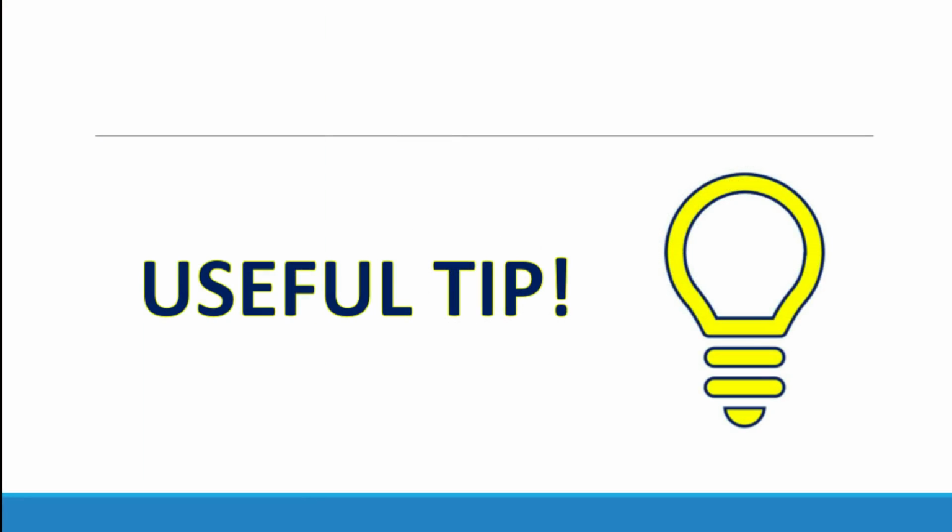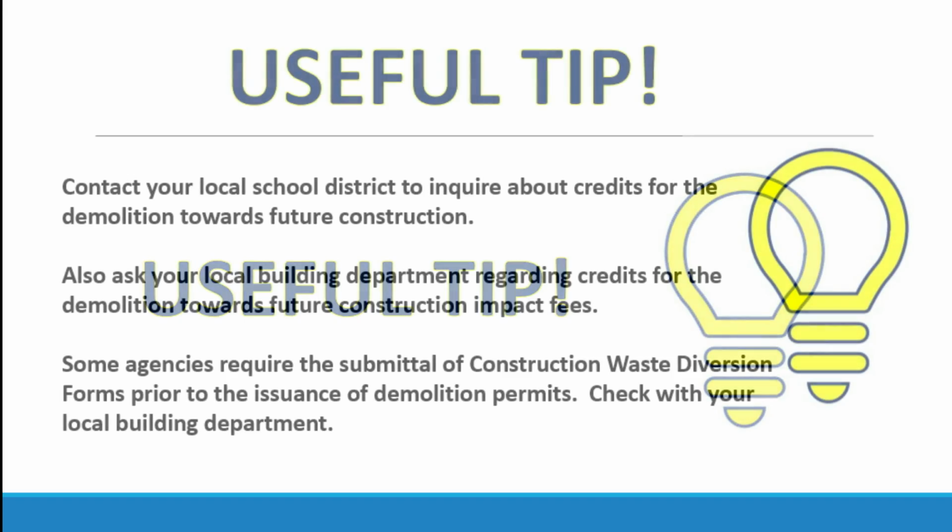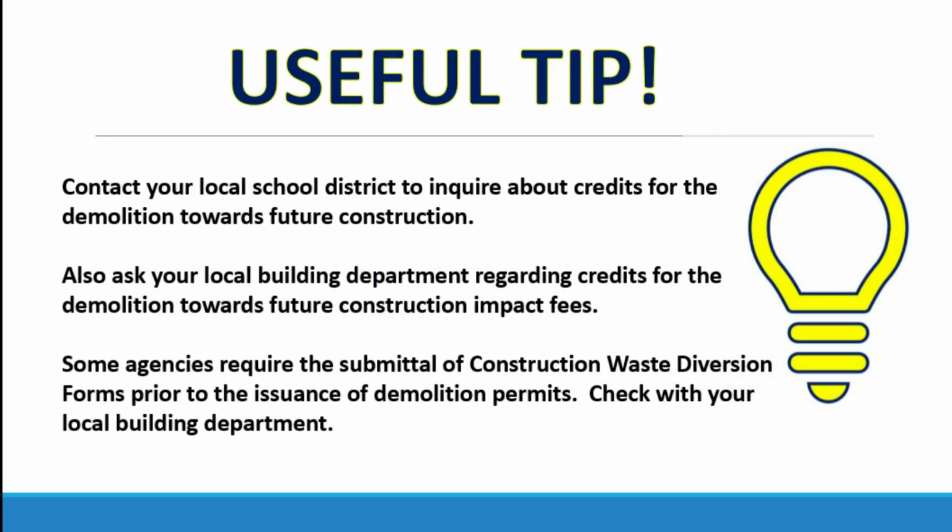Here's another useful tip. It is not unusual for local agencies to credit the demolition of structures towards future construction. So check with your local school district if they collect impact fees for new construction in your area, and check with your local building department regarding local impact fee credits that may be applicable.